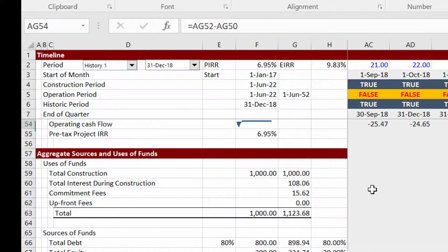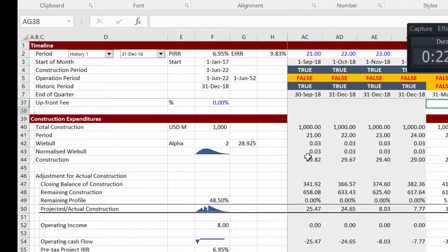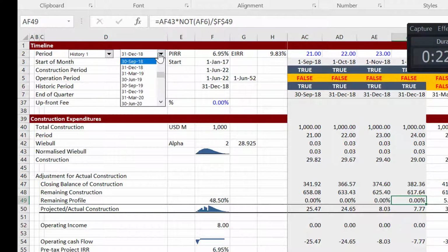Once you are past the historic switch, here's our final number. If it's the historic switch, then just go down and take it from the balance sheet. Otherwise, use your revised S-curve that we're going to talk about in just a minute and multiply it by the revised S-curve. That's the way we can just change the dates around.